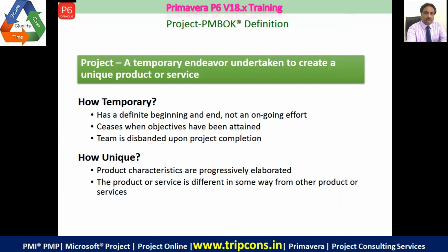Phase 2 would be doing the civil engineering work, maybe, then the mechanical engineering work, then electrical electronics, then the finishing touches, so then the testing, and then the operation team training. So I will keep the rest of the project at the top level, and I will plan in detail the first level. Okay, so how unique the product characteristics are progressively elaborated.